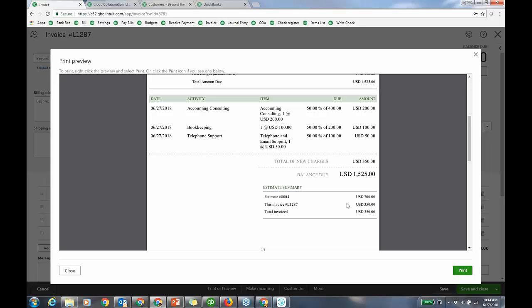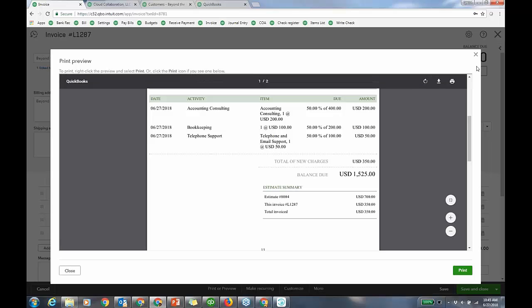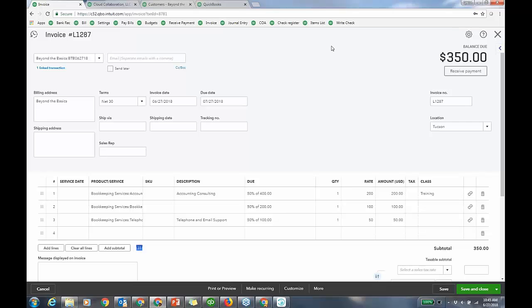So the visibility on progress invoicing, and then we'll stop with progress invoicing and move on, is at the transaction level, meaning the estimate and the invoice, not in the sales center, not in the customer record, and there's not a report yet. We're working on that. It's really version 1 of this progress invoicing. The report's still going to show the open invoice as being $700. So it's at this level. That's good to know because if your client really needs reporting on progress invoicing, then maybe they don't use progress invoicing yet till it's fully baked, right?